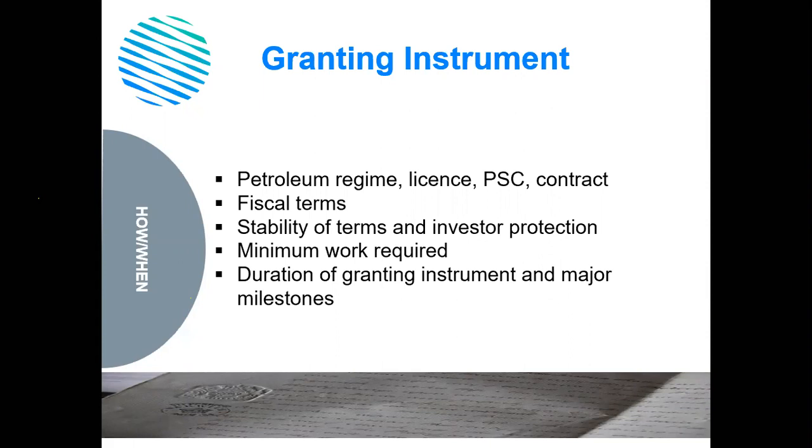Or if you're at a field regeneration opportunity where you're looking to redevelop the field, what minimum obligations do you have, for example, to carry out well workovers? This is a very important part of the opportunity of the project that you want to do, because this will determine your absolute minimum expenditures and draw on resources as you carry out the project.